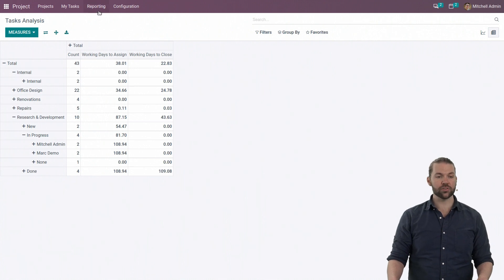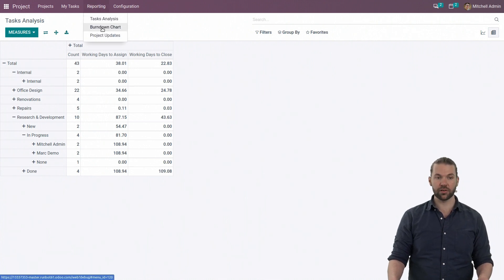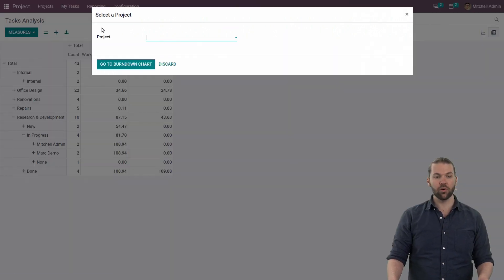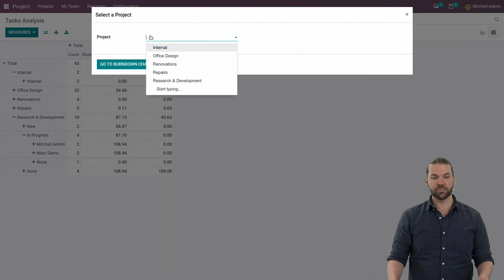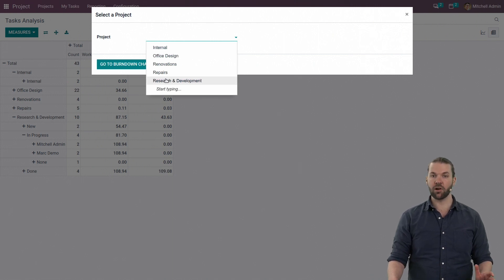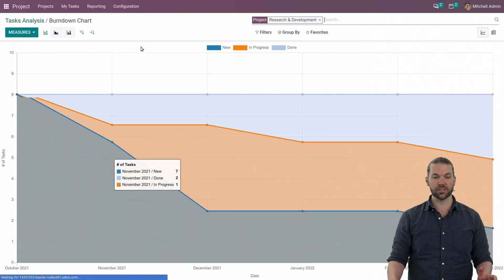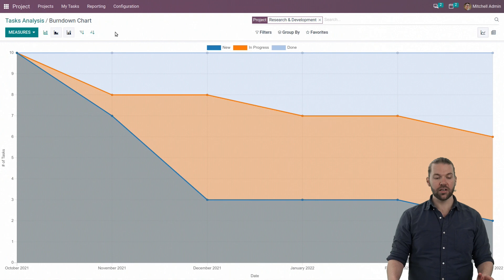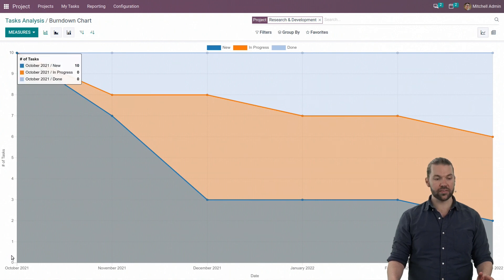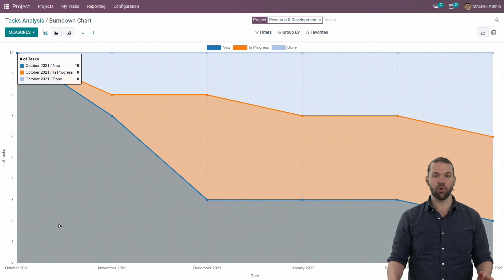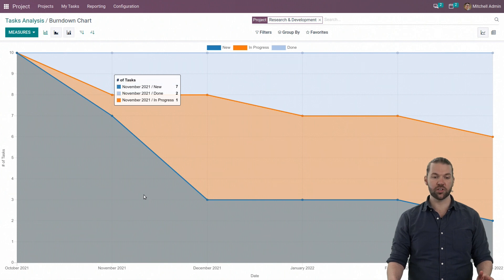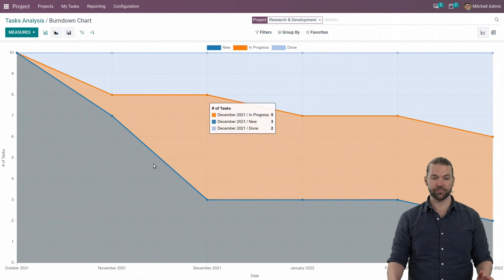Now, from here, we also have BurndownChart, another nice report. It's specific to a project. It can't be on all projects because the way it looks, essentially, is you're looking at the different quantity of tasks per stage over time. And the stage is determined by the color coding.